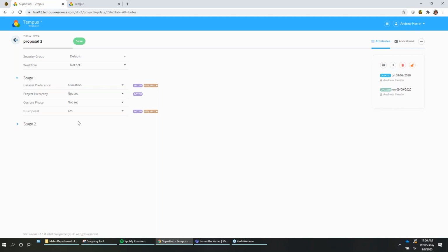Obviously, there will be some that will be automatically added to those projects because that's kind of the skill set that they work with, and so they'll be added to those projects. But oftentimes, you're looking at more shirt sizing estimates or taking SWAGs at specific projects and saying, hey, X number of hours for this role or this skill set, and moving forward. So this proposal flag allows you to then go in and really use the meat of the tool in the what-if scenario to be able to fine tune and see exactly how that's going to plan out.